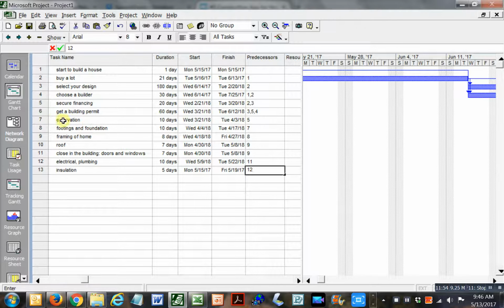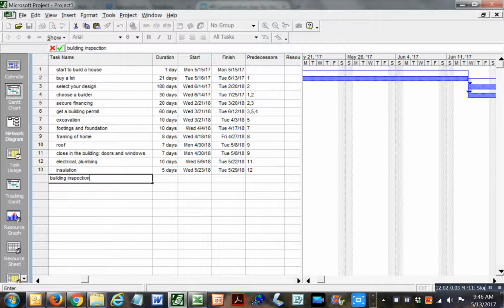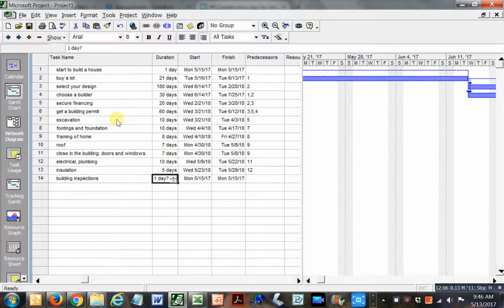And then you got to put in building inspections, right? There'd be a whole bunch of them, but you certainly will have to have an electrical inspection, right? Your plumbing inspection as well. And, even though it doesn't take that long to do these inspections, your city building inspector will come in and do that for you. You still have to schedule with him or her, and that can take a while because they're busy. So we'll put in a week for that.